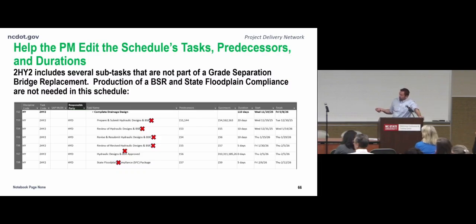It's for us as project team members to edit the tasks, predecessors, and durations, and by doing so for our own tasks, we set the other units up who are doing the exact same thing that we are to help formulate a holistic schedule for the entire project. And if everybody does their part and the PM guides it, then you end up with a very comprehensive project schedule, which is actually very useful.